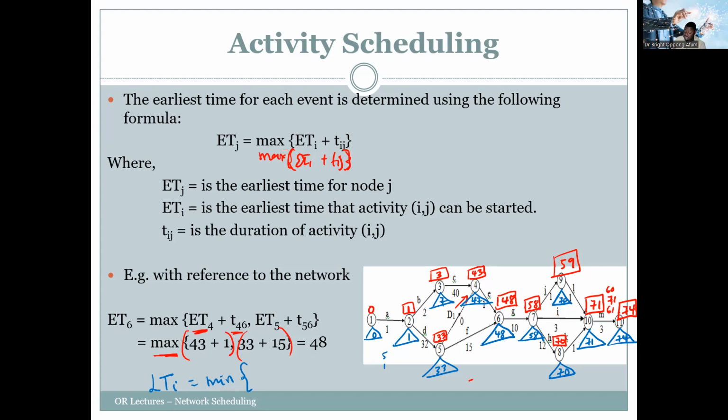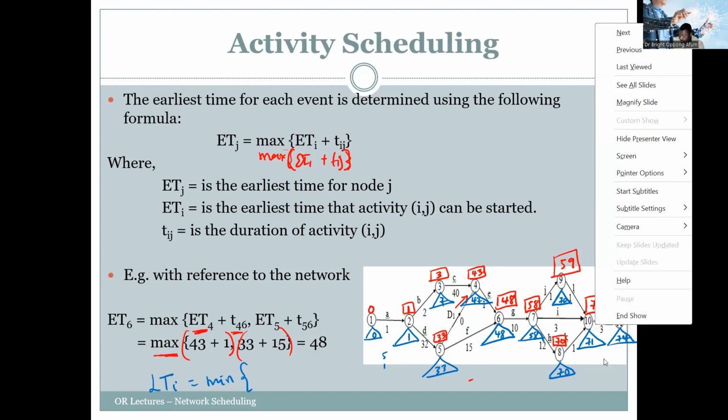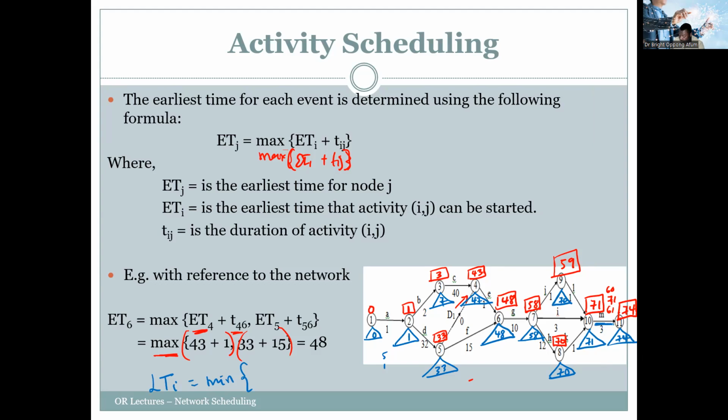And usually to get a critical path, it's just the activities that have the same earliest time and latest time. So I have a double line here for the critical activity: 70, 70, I have that. 58, 58, I have that. So I'm just doubling the lines. 58, 58, then 48. So this line, 33, 33.